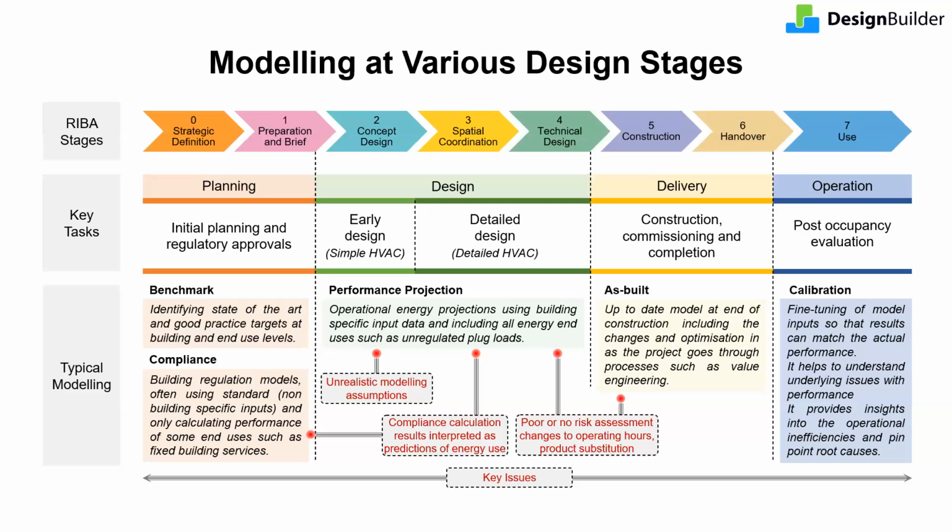Furthermore, as the design goes through the construction and until the handover stages, changes in design or proposed operations generally occur. Such changes include operating hours or product substitutions during value engineering. Therefore, at relevant stages, especially at handover, the model and projected performance should be updated.